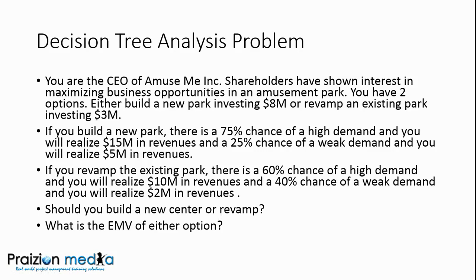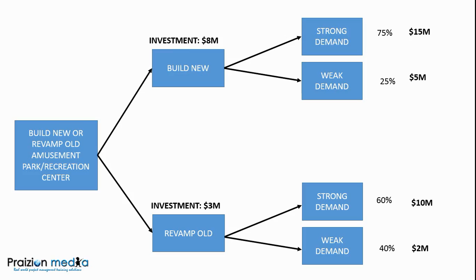You need to be able to draw the different nodes and where the different options branch out. You can see the investment of $8 million. If we build, strong demand — a 75% chance of that; weak demand — a 25% chance of that. And then if we revamp, we've got the investment of $3 million, strong demand at 60% chance with $10 million revenue income, and then weak demand — 40% chance of that happening with $2 million revenue.